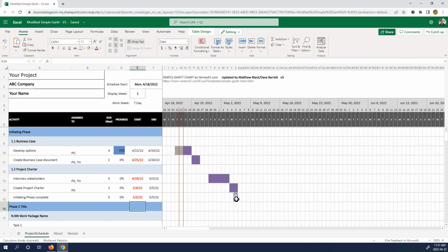Now notice milestones look a little different. They have that little starburst in the middle, and that indicates a milestone complete. One little thing is when you do complete your milestone, so as we work this through, these will eventually turn into 100%, hopefully, but you complete all these, and this will become, say, 100%. Once this becomes 100%, your milestone is now achieved. And if you update your milestone to be 100% complete, it turns red. So that's another little feature, is that milestones, when they are complete, pop out in terms of red.